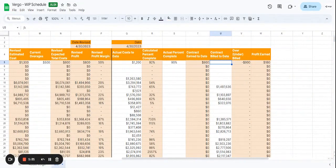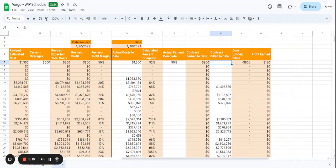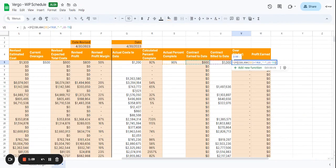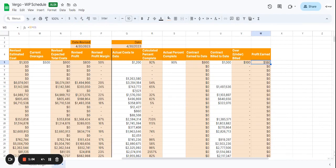Then we have the contract billed to date. Let's say we billed $1,000 to date, just to give you an example. And then that's going to read here our over-under billed. So we have $100 here, which is based on the information that we've already inputted. And then we have $180 profit earned based on everything that's already been calculated.